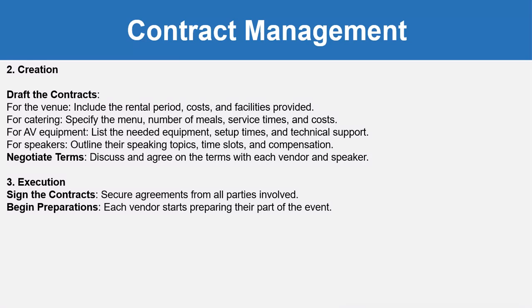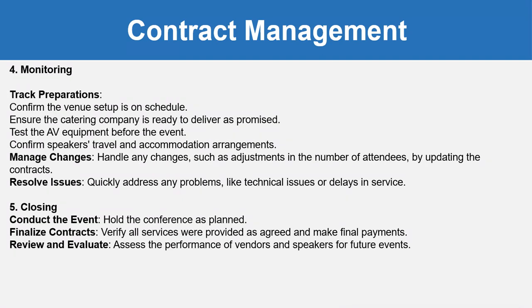After that, the execution will start, in which we sign the contracts, like secure agreements from all parties involved. Begin preparation means each vendor starts preparing their part of the event. Monitoring means confirm the venue setup is on schedule, ensure the catering company is ready to deliver as promised, test the AV equipment before the event, confirm speakers' travel and accommodation arrangements,